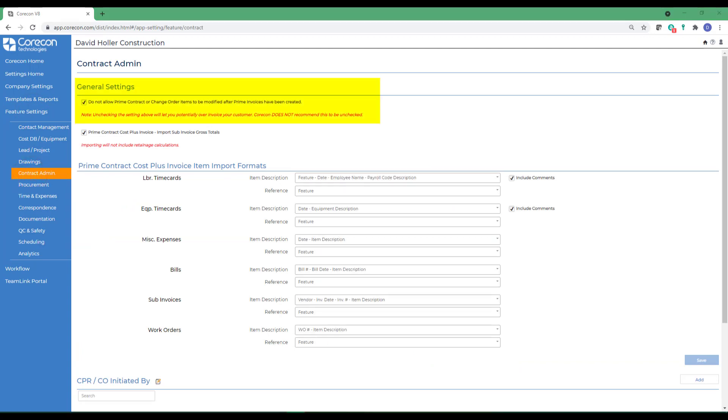The first option under general settings is the ability to toggle on or toggle off the ability to change prime contract and change orders once the prime invoices have been created.